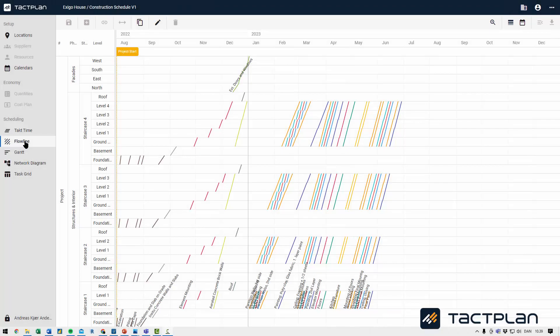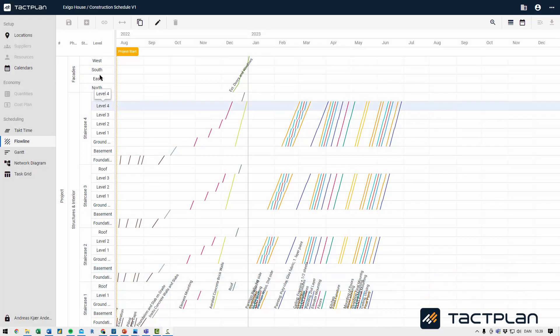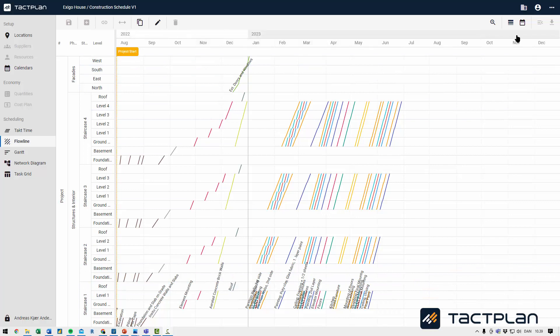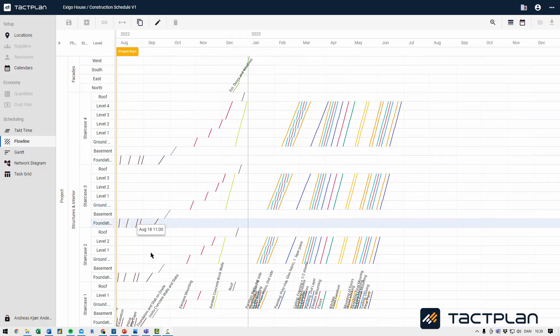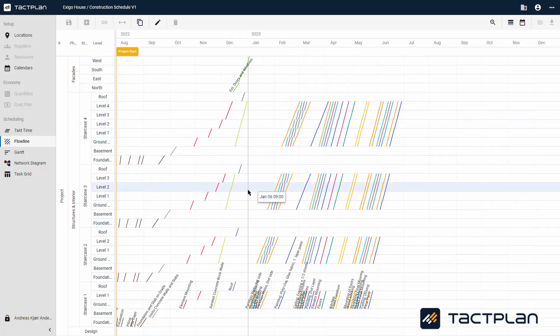In the Flowline view, you get a full overview of the entire schedule. To the left you will find Locations, and at the top you will find Time. Tasks are shown in the middle. The Flowline view is used to add tasks and find areas where you can optimize your schedule.